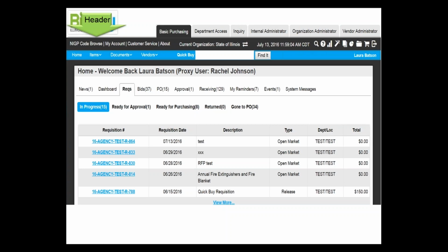Your procurement, no matter which document phase it is in within the system, will be date and time stamped with the BidBuy date and time. So we want to be sure that anything that is received in paper is also stamped with that BidBuy date and time, so that it is very clear and transparent throughout the system that it is the same date and time. It doesn't go by a date and time on your desk, or your computer may be different. It's very important that it goes by the BidBuy date and time if you're date and time stamping anything.